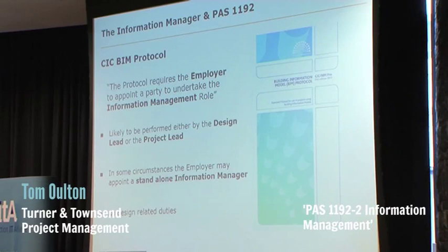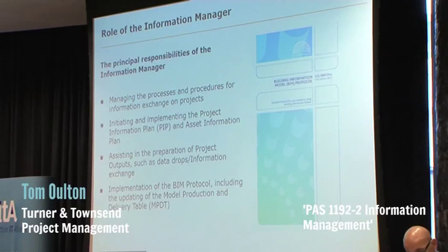This document has been designed to be used by the construction clients and contractor clients with an aim to manage the work of the supply chain, subconsultants and subcontractors. It outlines the principal responsibilities of the information manager as managing the process and procedures for information exchange, initiating and implementing project information plan and asset information plan, preparation of project outputs such as data drops, information exchanges, and the implementation of the BIM protocol itself.